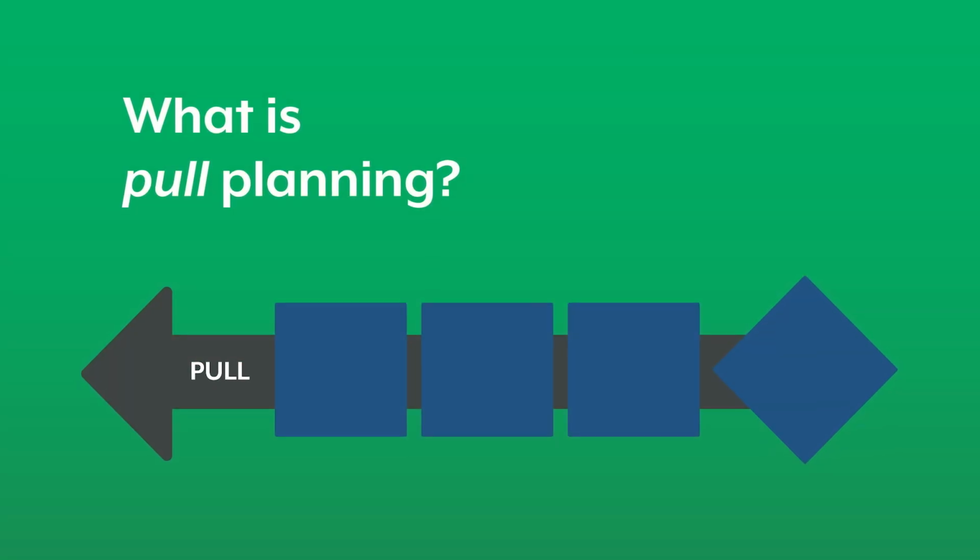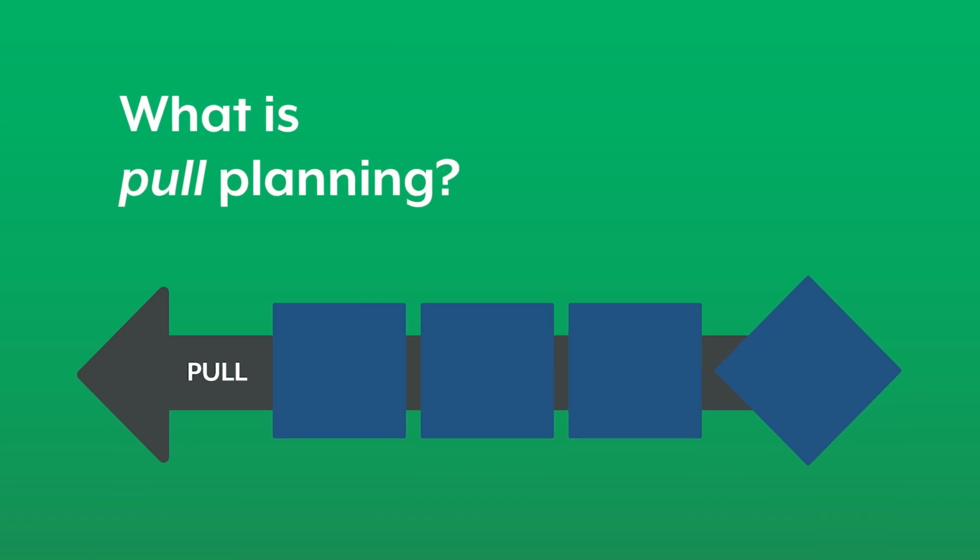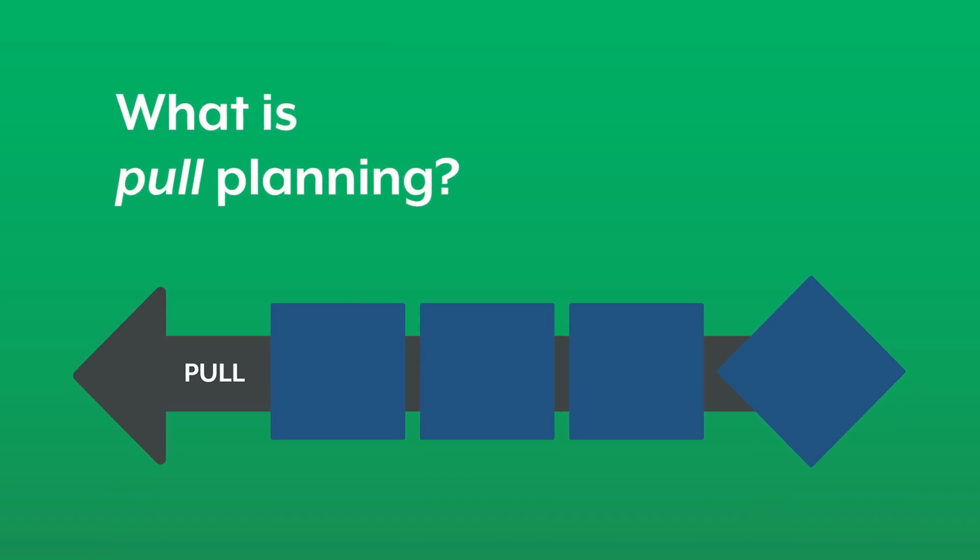Pull planning is the other way to handle this. Rather than a schedule being pushed upon the team in the field, work only gets released once the field has confirmed that they are ready and available to take on those tasks. And this is where the phase pull planning module of Nialli Visual Planner comes into play.